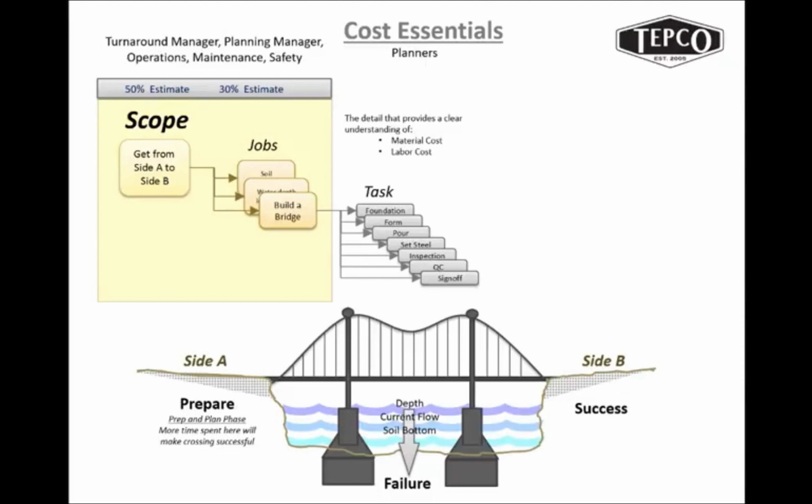So at this point in time, it would give us a clear understanding of the material cost, how much labor would be involved to do this, because planners are telling you about the number of people and the amount of time that they think it's going to take. The tools and rental equipment that we're going to take to actually stand this bridge up, and any of the miscellaneous support that we may need. That may be on-site or off-site support to actually put this bridge together.